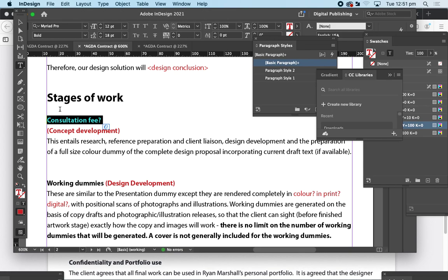You're not allowed to demand that much upfront. It's a business decision. As a tradesperson, you're only allowed to ask for 10% before starting. As a sole trader, you would stick to the 10% upfront. Yeah, okay. But once you're doing business over 70,000 a year, that's when a small web developer or web business often asks for quite a lot upfront. So as a sole trader, you could ask 10%. That would be up to you. At this stage, a lot of you might leave that out of the contract, especially if you're doing voluntary work, but it's something to think about further down the track.